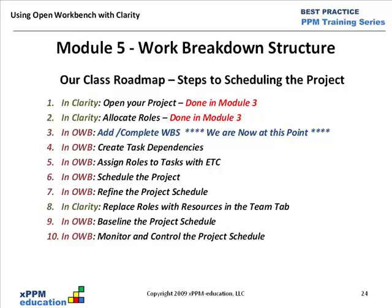Following this module, we get into creating task dependencies in Workbench, then assigning roles to tasks with ETCs in Workbench. Item six, we schedule the project in Workbench. Item seven, we review and refine the schedule in Workbench. Item eight, we go back to Clarity and work with the resource manager to replace roles with resources. Item nine, back in Workbench — or in Clarity — we baseline the project. And finally, item ten, we get into the monitoring and controlling process, which is an ongoing weekly activity.